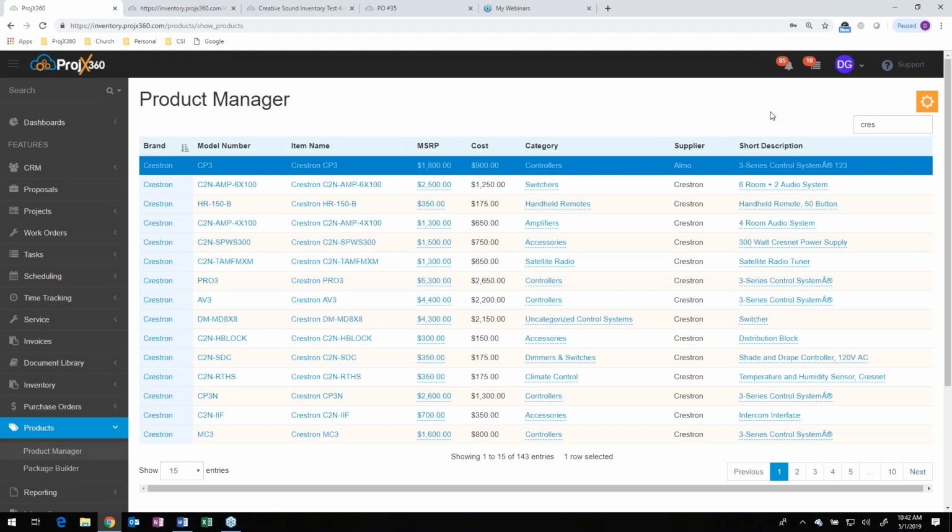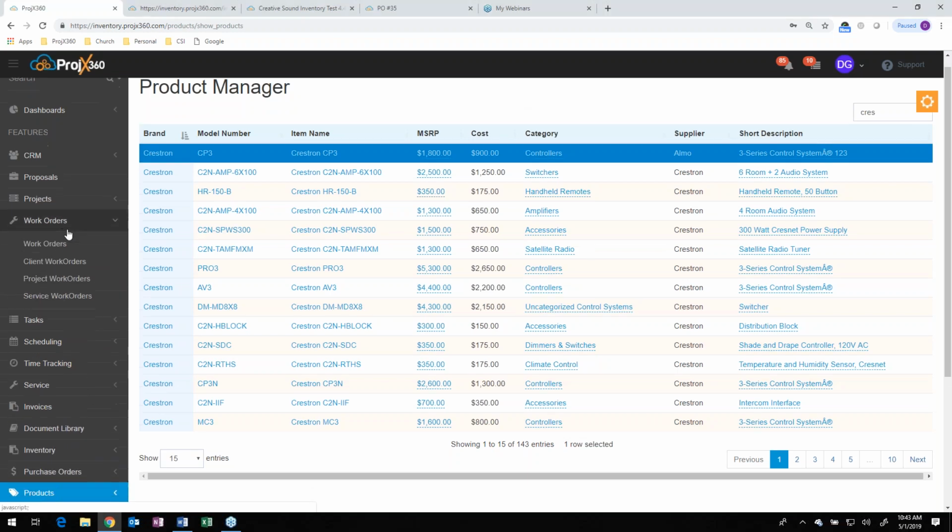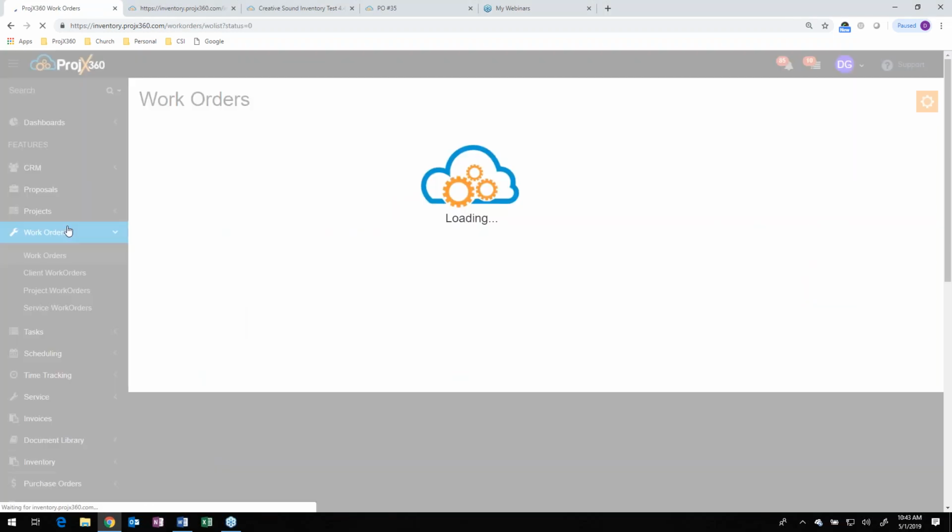How do you ensure that the products requested or ordered have been invoiced out to the customer? Well, that goes into your invoicing side of things. So you can do invoicing a couple different ways. You can do progressive invoicing from the payment schedule in the proposal. You can, if you want to do a product request and then send all that stuff to the work order, from that work order, if you guys bill as you deliver.